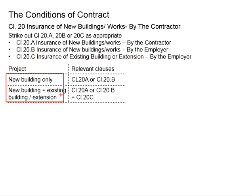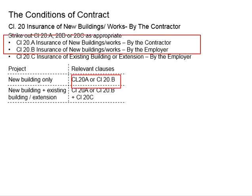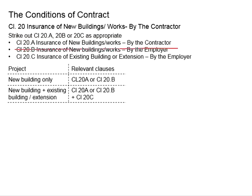There are two scenarios. The first scenario is that the project involves only a new building and there is no existing building in or near the construction site that may be affected by the new construction work. In this case, the relevant clauses will be either Clause 20A or 20B. The employer decides who takes up the insurance; if the employer does it himself, Clause 20A is struck out, otherwise Clause 20B is struck out.